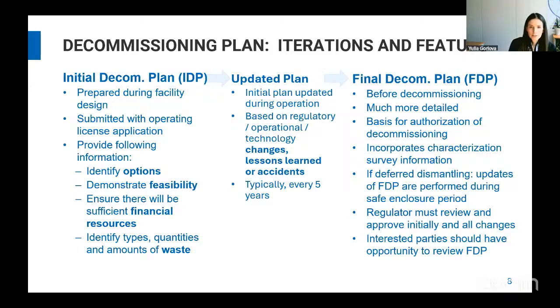But in the case of, for example, deferred dismantling, the final decommissioning plan is also updated, and some additional work is performed during these periods of safe enclosure that can be up to several decades. And the regulator then reviews and approves all changes to the plan every time the licensee submits them. Also to mention, interested parties should have the possibility and opportunity to review the final decommissioning plan.